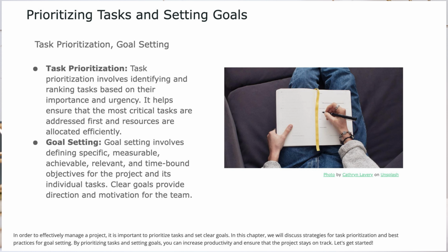So, for example, if Alice had task A and task B with the same level of priority and impact level, but task A would take 3 days to complete, while task B would take 7 days to complete, then Alice should take task A first because it will take Alice less time to start delivering value. Assuming Alice can't take on both tasks simultaneously.